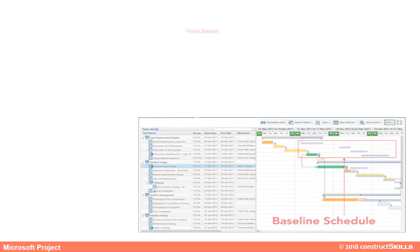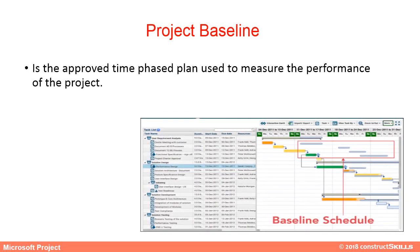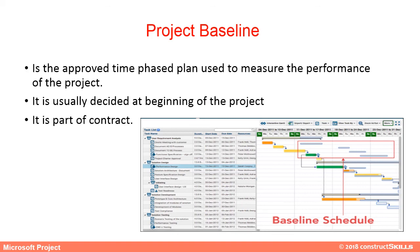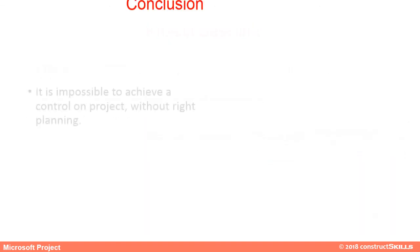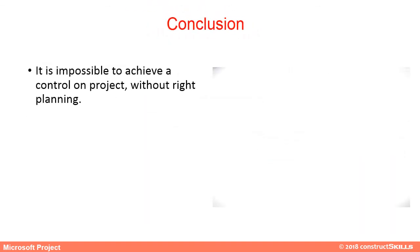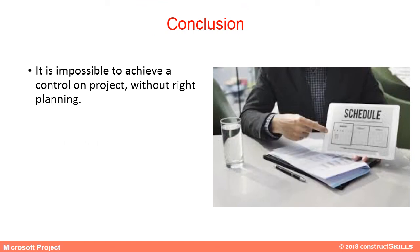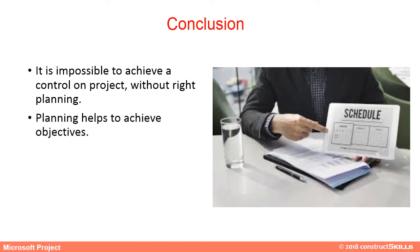The project baseline is the approved, time-phased plan used to measure the performance of the project. It is usually decided at the beginning of the project and is part of the contract. It is impossible to achieve control on a project without proper planning. Planning helps achieve objectives, and MS Project is a tool that helps achieve planning objectives.